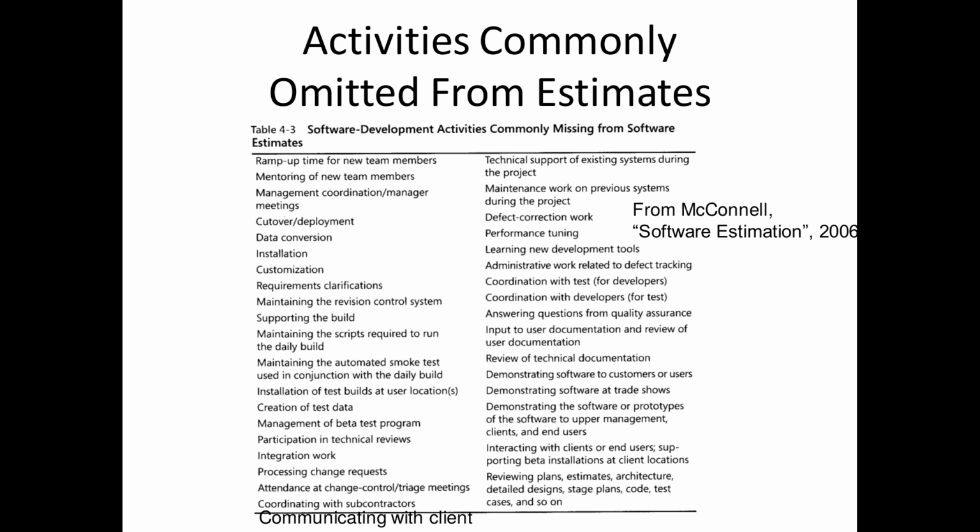And even if that new person is trained, often they're not delivering at the level that someone who was really experienced with the project was, right? I mean, the person who left had all this knowledge about the organization of the repo, all this knowledge about the particular technologies involved, who's responsible for what, where the system's going, what the stakeholder wants, where certain documents are stored, and now you've got a new person who needs to be onboarded with that.